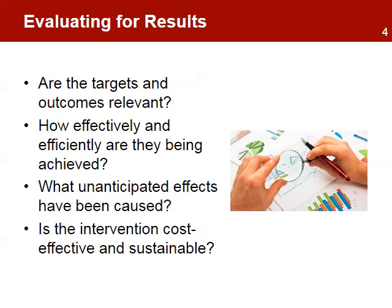Evaluation seeks to answer the following questions: Are the targets and outcomes relevant? How effectively and efficiently are they being achieved? What unanticipated effects have been caused? And is the intervention cost-effective and sustainable? Answering these questions can help determine the changes that are needed in the project to improve the intervention and achievement of results.